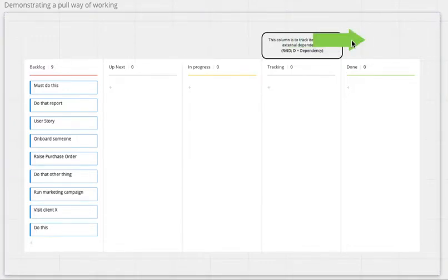When the team meets on its daily 24-hour planning conversation, or daily Scrum if you're using Scrum, you stand on the right and you look back to the first populated column. Now it's an ordered list, which means the most valuable thing today is at the top. So you look down to that first item and then you swarm. You focus on idle work, not on idle workers. What you do is you say to the team, who can do what on this work item to move it into done over this next 24 hours, or at least move it closer to being done. And they form a plan, they collaborate. So this is collaboration, this is being agile. It's valuing the interactions between individuals, which is the first value statement of the Agile Manifesto.